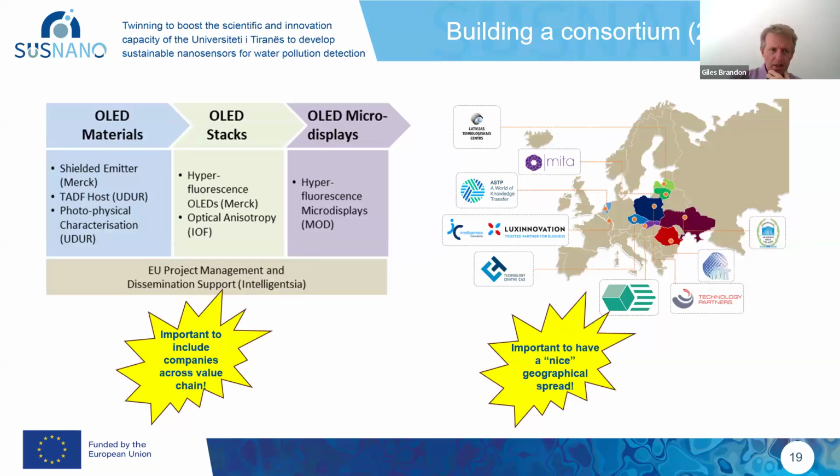Now, in the case of that project, and in fact any kind of technology development project, it's very important to show that you have in your consortium partners from across the value chain, that you have industrial partners. Whatever the technology is, ask yourselves, where is value created? Where are companies selling subsystems, subcomponents, and try to make sure that your consortium has industrial components reflecting each of those.